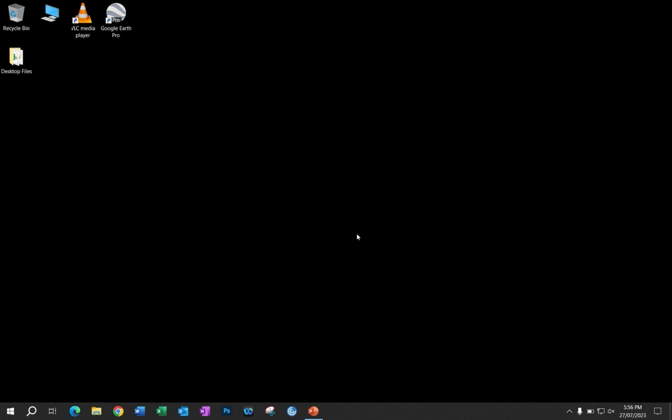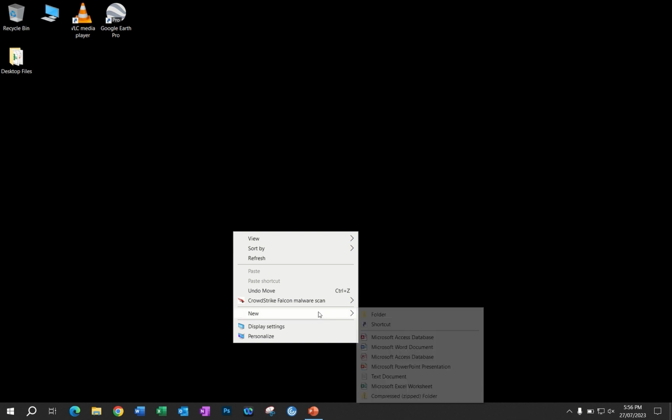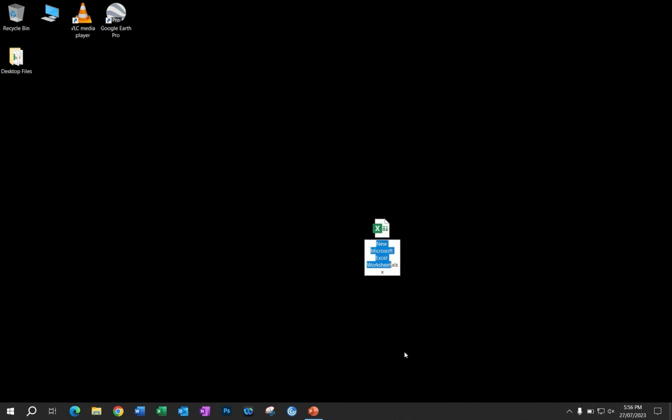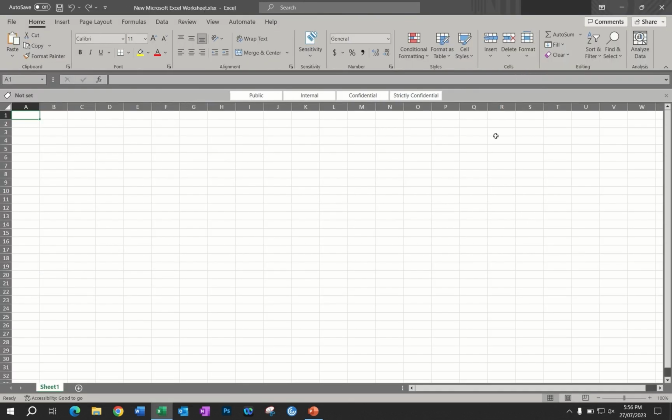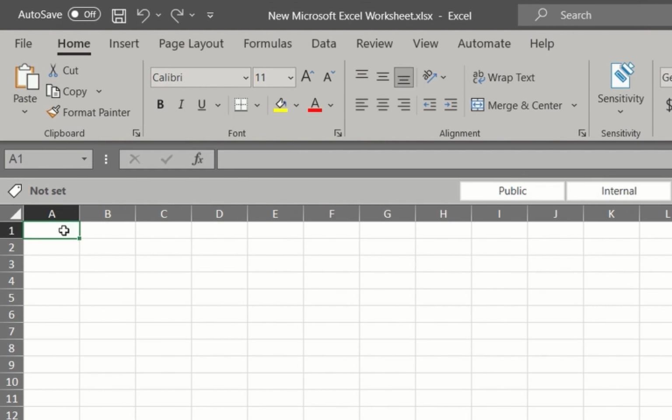Okay, let's get started. Create a new blank Excel spreadsheet. I do this by right-clicking on the desktop and selecting New Excel Spreadsheet. In the very first cell, let's start with the Names category. These will be the names of our products or our projects. The next column is for when our timeline for each product or project starts. Now, let's create a column for when each product should launch or when the project needs to be completed. And finally, a fourth column for the project duration.